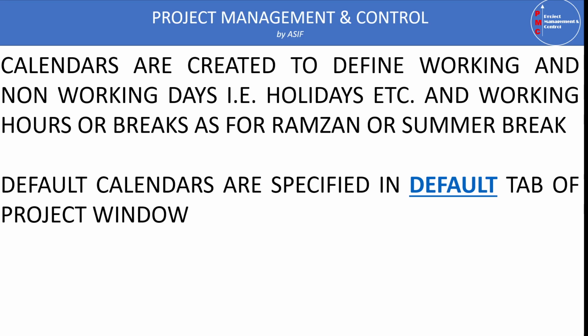This is very important in the Gulf countries, because in the Gulf countries there are short working hours during the month of Ramzan, and there is a summer break of 3 or 4 hours during the hot weather. So in this case, it is always recommended by the client and consultant to define the calendars which define the holidays and the working hours in the country.